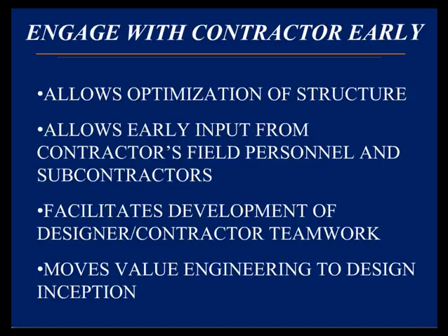The other thing that happens when you engage with the contractor early, and of course, this is usually possible in private market projects, not near as easy to pull off in a public project, because typically with public projects, you finish the design, then it goes to bid, and you have no idea which contractor you're working with until construction starts. But for private work, at least, contractors are very often, for large projects, selected very early in the process, and it's important to build that dialogue right out of the gate.